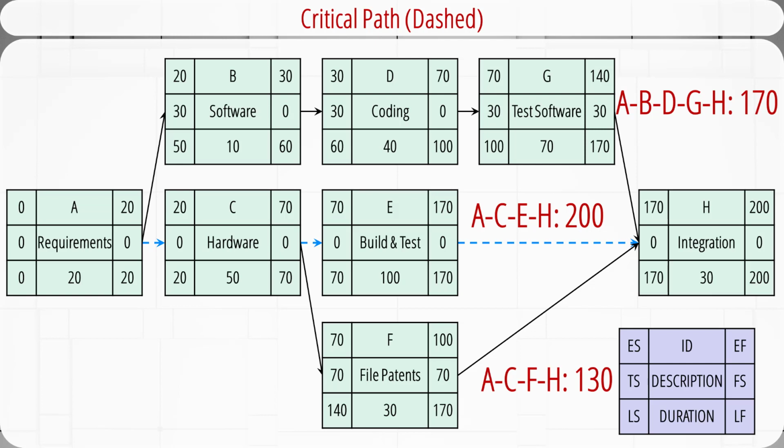Since the critical path determines the project completion time, the project manager should put best people on these critical activities and pay extra attention when doing risk assessment. Critical activities typically represent about 10% of all the activities of the project. The project manager should closely monitor these critical activities when they don't have time to monitor all activities. These activities are the ones you won't even consider when other managers ask you to borrow people or equipment.